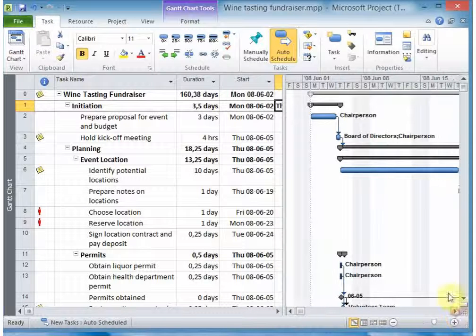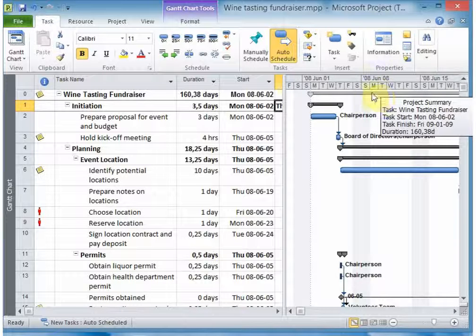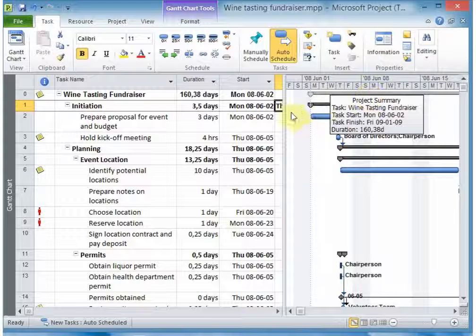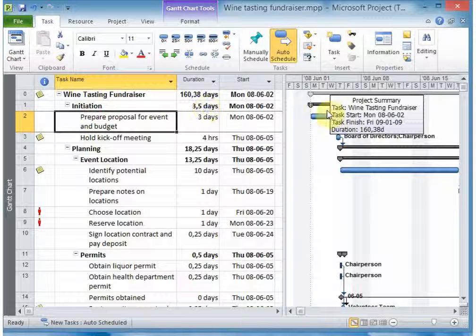And in this window, you will see there that Microsoft Project will display for you the total project schedule, which is from the start date on the 8th of the 6th, and it ends on that particular day. So it shows you the whole project, but now it will break down the project in this way. It will give you all the phases in your project and say phase 1 of the project starts here on this day.